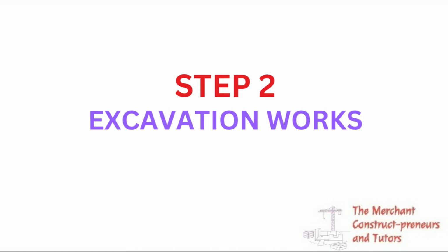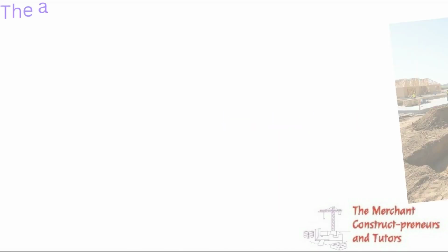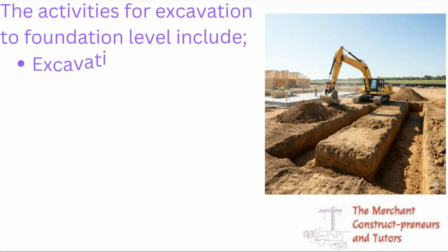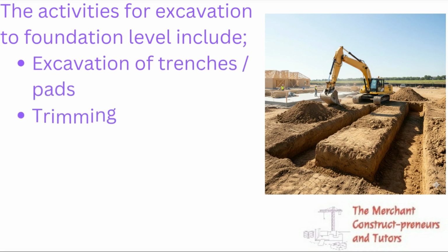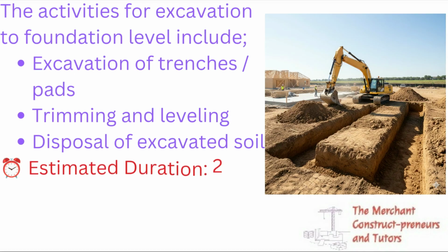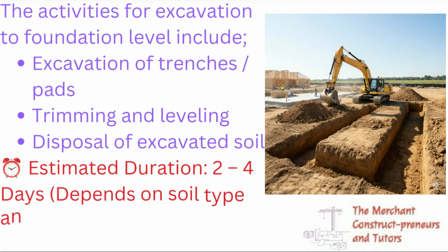So step 2 is excavation works. Now you've done your setting out. So the setting out is the representation of how the building is going to be positioned in the ground. So all those points that have been marked out will now be excavated trench by trench, just as you can see in the image by the side there.